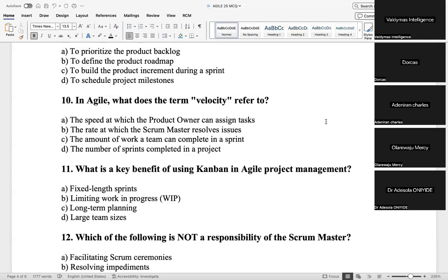And what that would do is remember that if I have, let me say I have 100 stories, and I've completed 50, 50 over 100 will be 50% completion, right? But if I convert like 20 of those stories to tasks, it will become 50 over 80. 50 over 80 will move us up to like 60-70%, right? Yes. So even if management is tracking, what management will be saying is 70% completion instead of 50% completion.